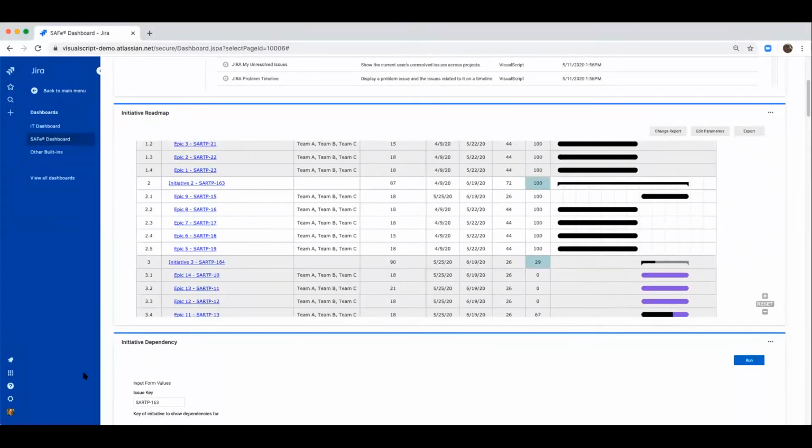All right. So as we're doing our roadmap planning, as we're planning these things out, we need to have conversations around dependencies. For example, there might be an attractive feature that we really want to get out to our customers. But in order to do that, we need to complete this infrastructure feature first, which management doesn't really see as something that's providing value to the customer, but it's required in order to get that valuable feature out there. We need to understand these dependencies. So as I said in the slides, dependency reports are really useful utility reports that help guide the planning process.